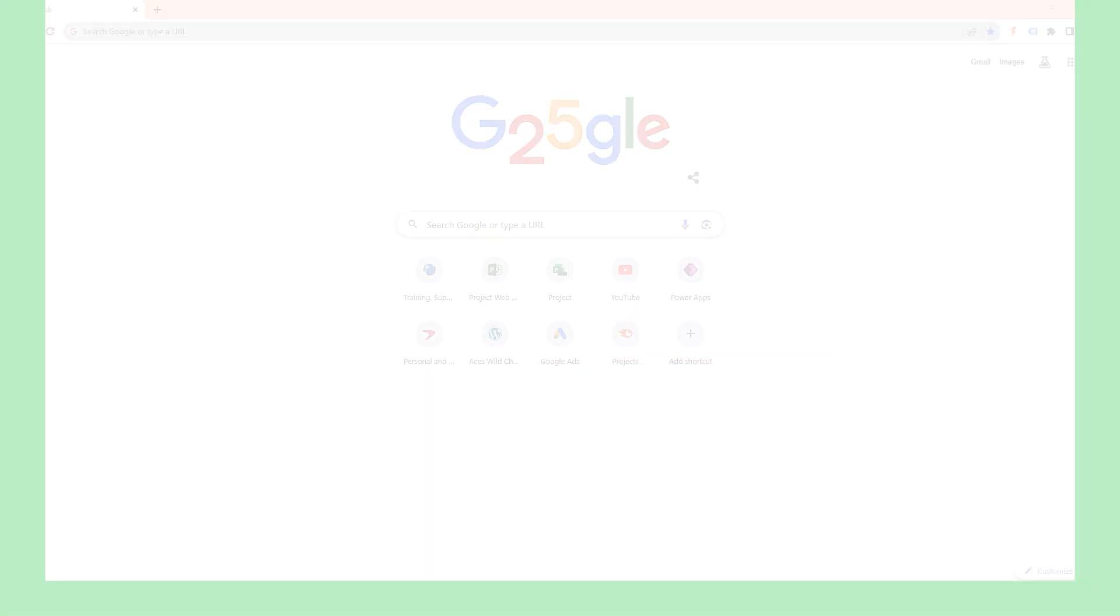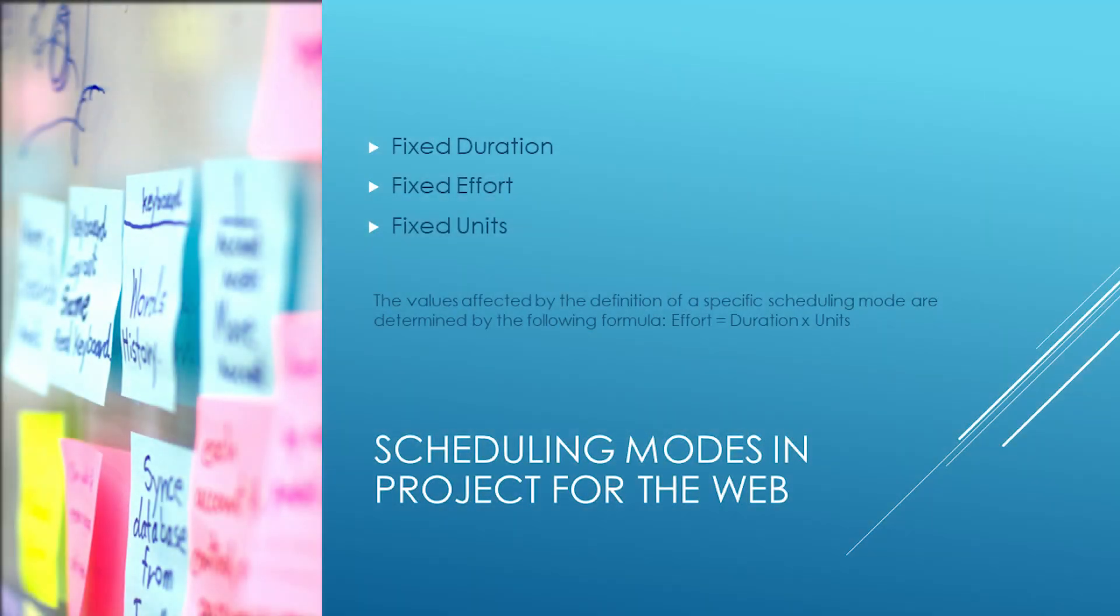Today we're going to talk about scheduling modes in Project for the Web. There are three different scheduling mode types: fixed duration, fixed effort, and fixed units. Duration is the number of days or time span to complete a task. Effort is the work, the amount of hours required to complete the task.